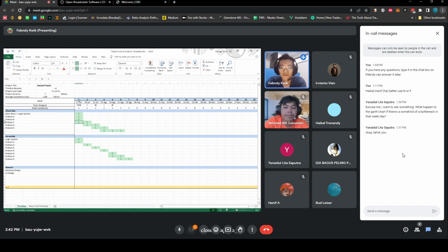So I prefer to do things pessimistically. Instead of this, if I knew this could be done, I'm going to do this instead, and I'm going to do this instead perhaps. This way, most of the time, I'm going to be ahead. In that case, if I'm ahead, that person I can allocate to other projects as well. This way you're preventing the delay.